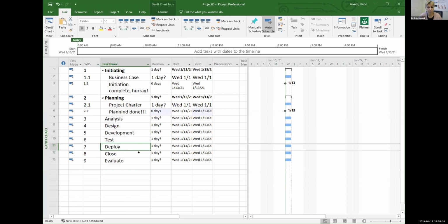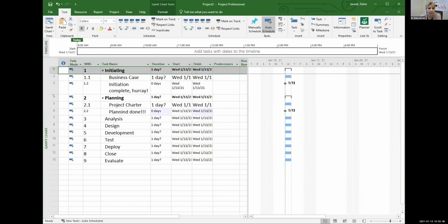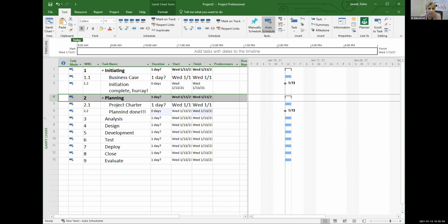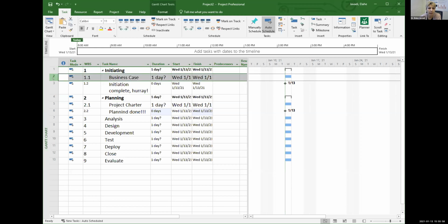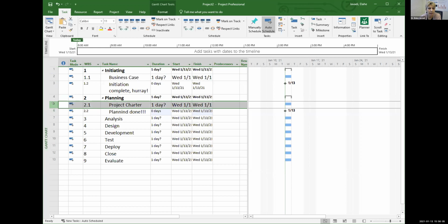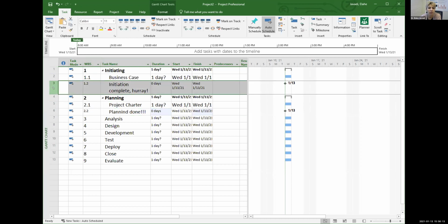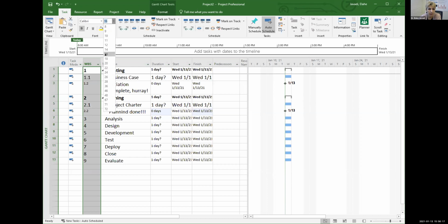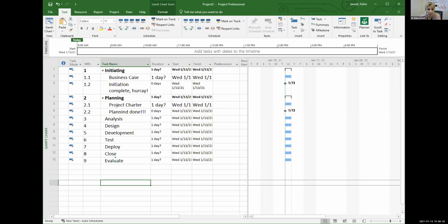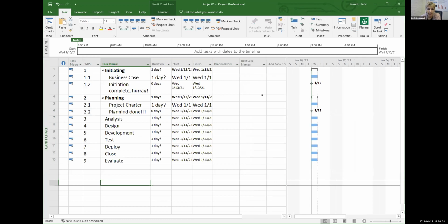this is a milestone. So what I have done, and it's written on your guide, if you didn't follow me step by step, your guide is telling you to do the same. List the phases, which we did, all the phases of SDLC and PLC, and we're going to have two major deliverables, one that's business case 1.1, and the other is a project charter 2.1. So two deliverables here. And then we added two milestones, one for each of the phases. I'm playing with the font sizes just to make sure things are showing up on your screen for you to follow.